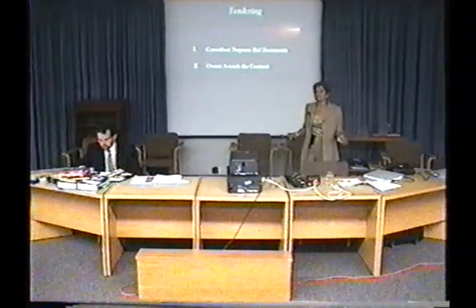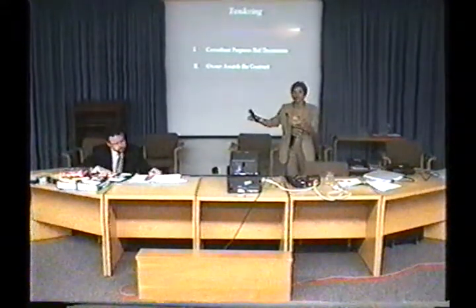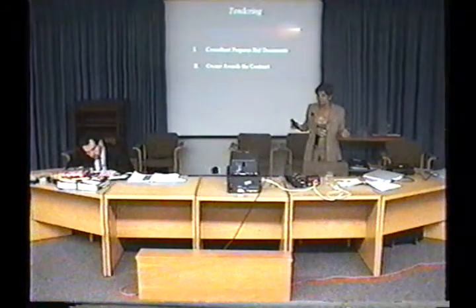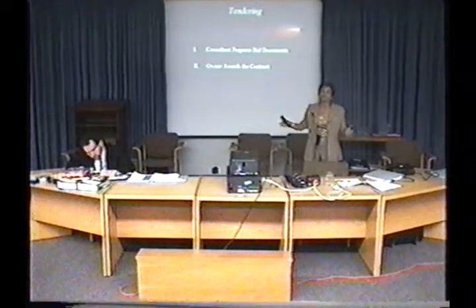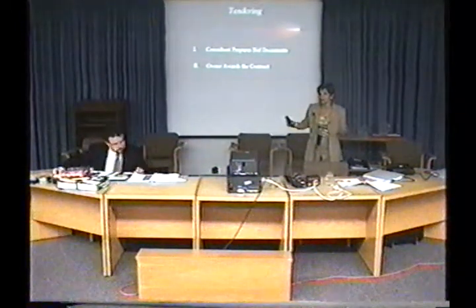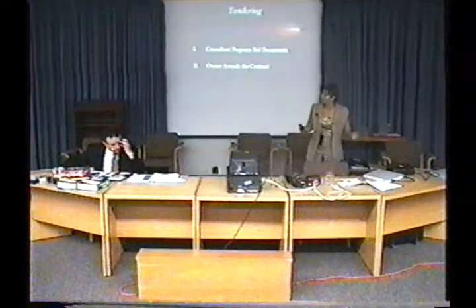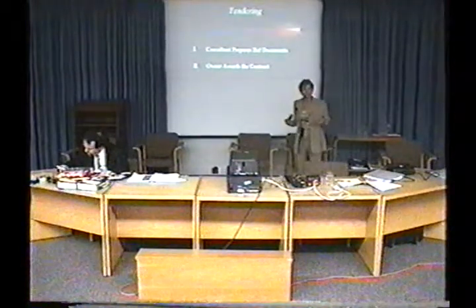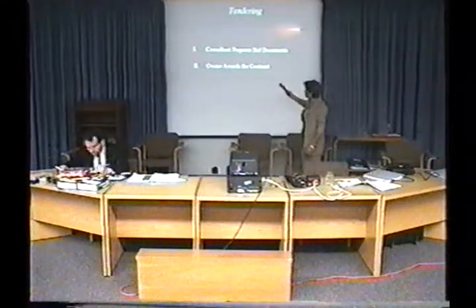The tendering process is right at the start of any construction procedure. A consultant or a project manager gets hired by the owner. That person puts together the drawings and tender documents, and calls for bids from a number of contractors. And after the bids are received, they evaluate and award the contract. And usually the owner is the one who makes this decision.